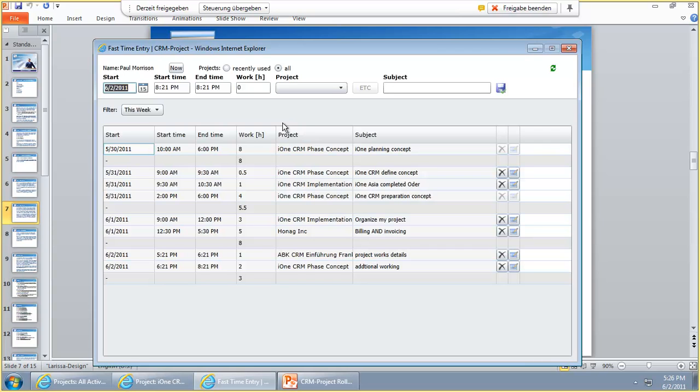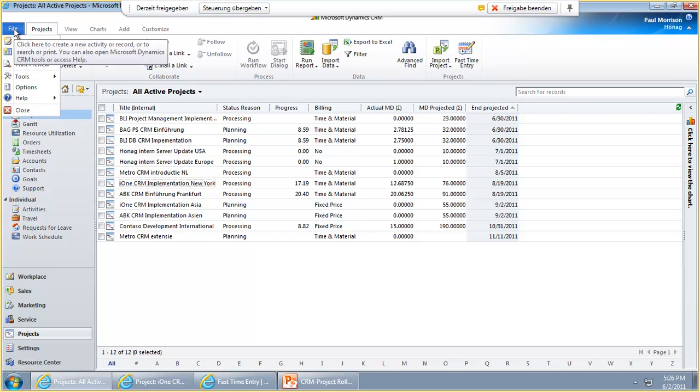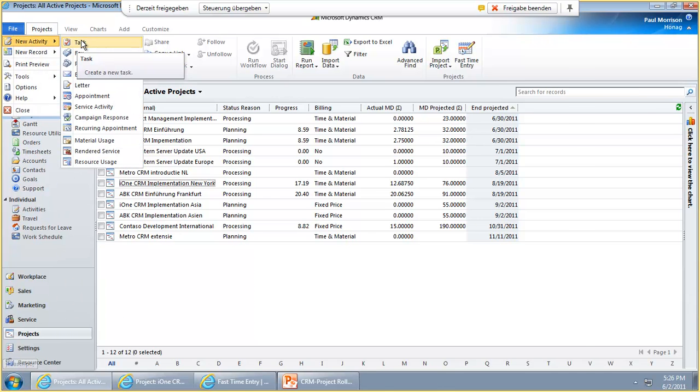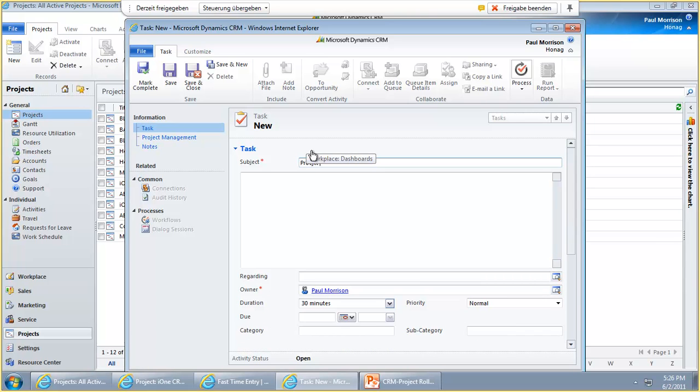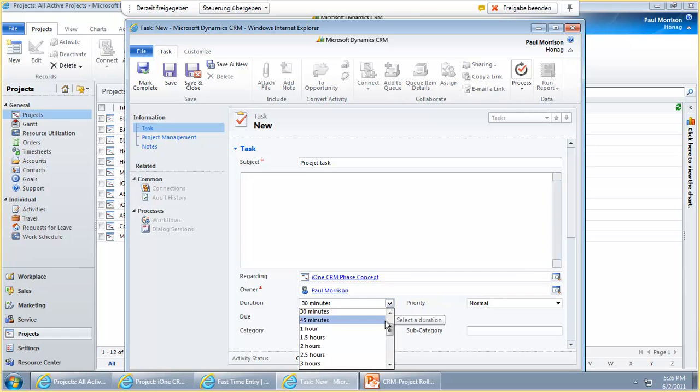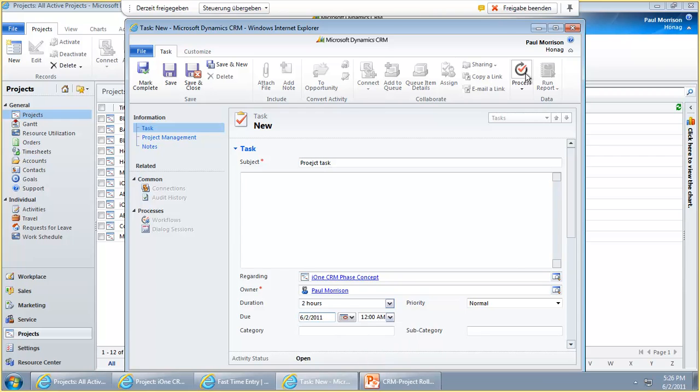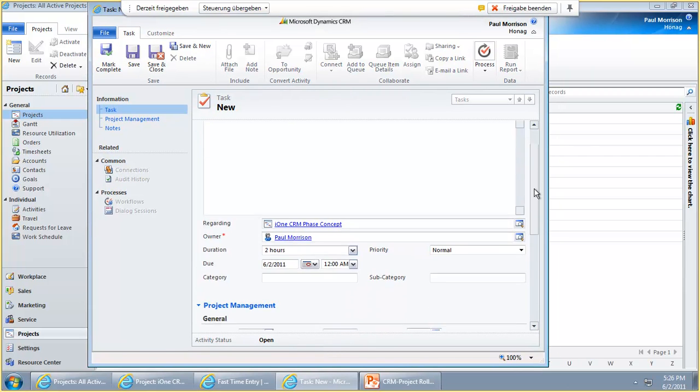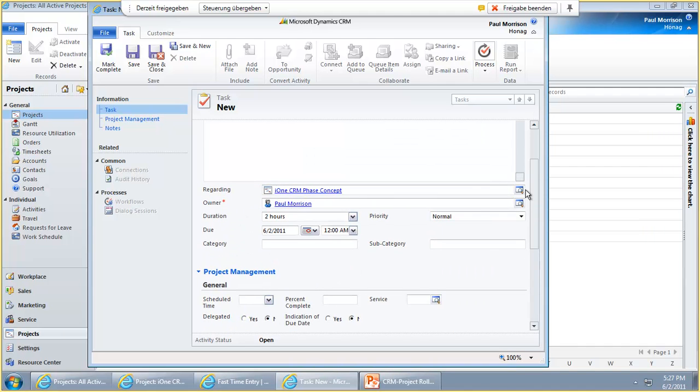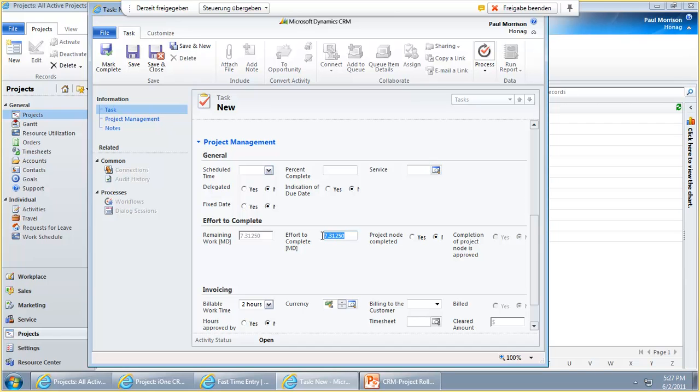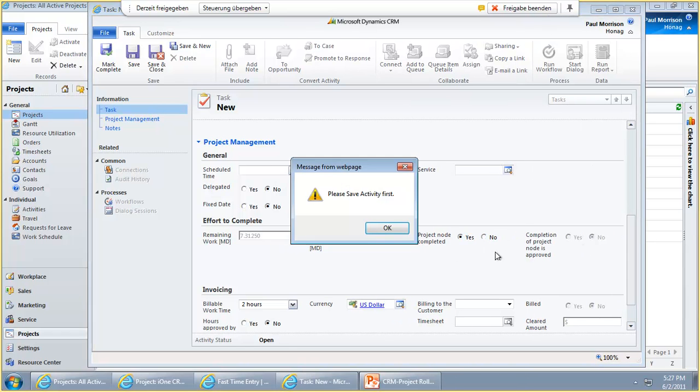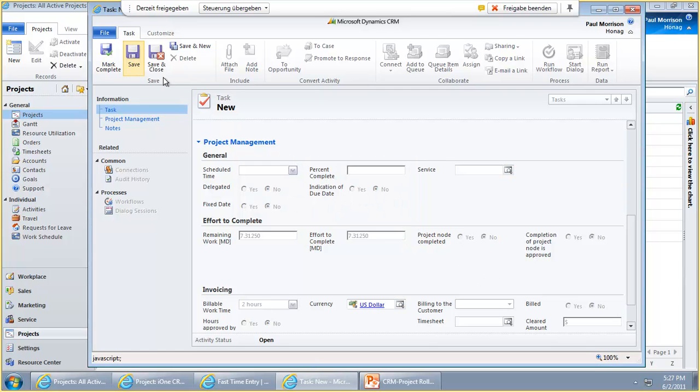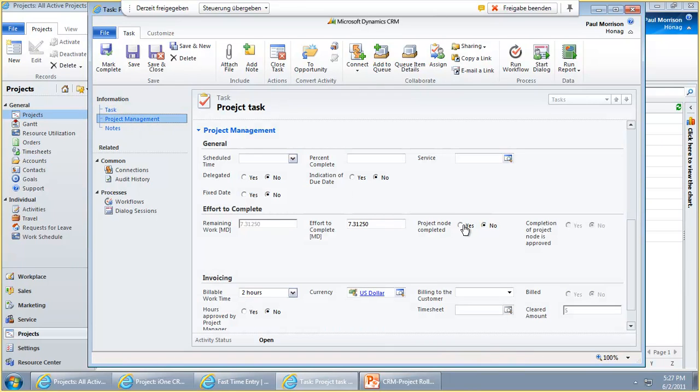You can see this Effort to Complete not only on the Fast Time Entry, you can see it in all activity types throughout the whole system. If we choose, for example, another method to enter more times, I go to file, click here on new activity, I open a task. There I choose project task and I go here to i1 CRM phase concept. There I want to make an additional time entry. I can do this here for example on Thursday too. You see here in the project manager section I have this Effort to Complete and it shows me now the new remaining effort that we just have entered some seconds before. It now shows up the 7.31, it automatically takes away these hours here. And I can again tell the system if I want to have a different effort or even if I want to tell the system that I'm completely done with this project work.